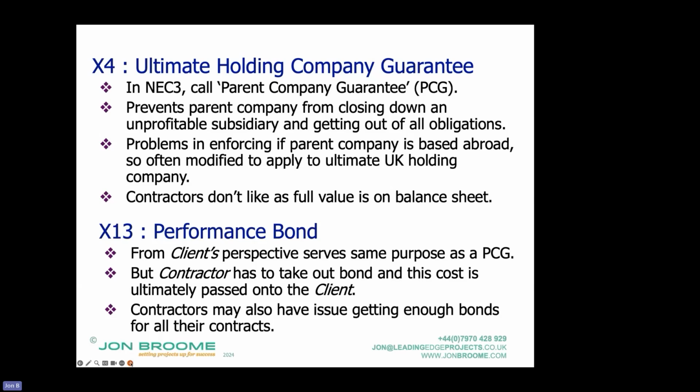Contractors may also have an issue getting the bonds from financial institutions, as financial institutions will look at their overall liabilities. If this contractor goes down and says, well, you've got 10 out already, I'm not giving you another. So they have to wait until another contract has been finished before the financial organization opens up to give a bond for that specific project and that specific client. So I hope you're getting the sense that everything has its pros and cons.